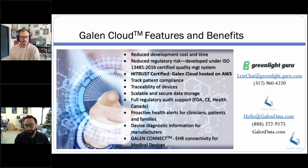Yeah, adding sites can be expensive too. So if you have a site that you start with and something changes, an investigator leaves or something like that, adding new sites can be pretty costly. Even a research coordinator, those are kind of the unsung heroes at a site. They're doing a lot of the actual project management at the clinical site. So sites that have long-tenured research coordinators or a really robust clinical team is really the ideal. If there's one person that you're hanging a lot of hope on, that can be a little bit risky, and that can lead to delays.